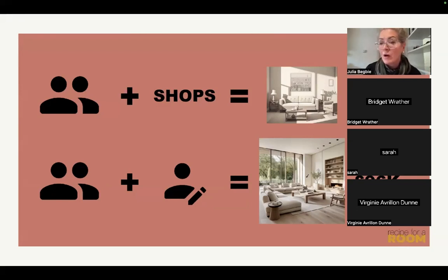And in fact, on very big jobs, I've created a spreadsheet to prove to clients that this is the case. So I've quantified all of the stuff we're going to be buying, including things like curtaining per linear meter, flooring per square meter. I've gone through and put in all the likely prices that they're going to pay, and I've demonstrated that my fees are not going to push this beyond the retail price of the project. I don't know if that sounds like a slightly spivvy way of working, but I just think it's such a powerful argument to make, particularly if your client is resistant to a big upfront fee on the grounds that they're worried that things are going to be terribly expensive.